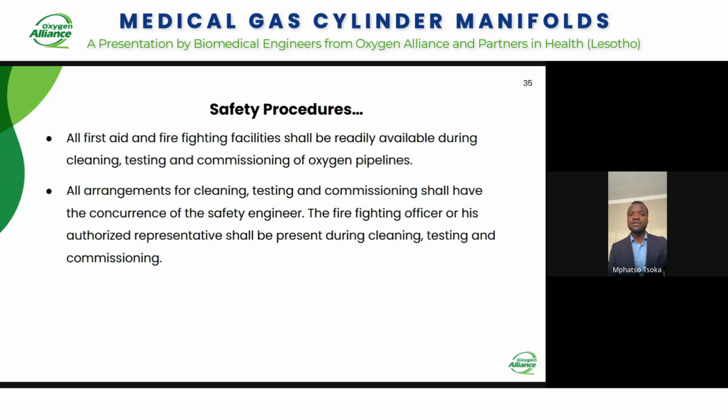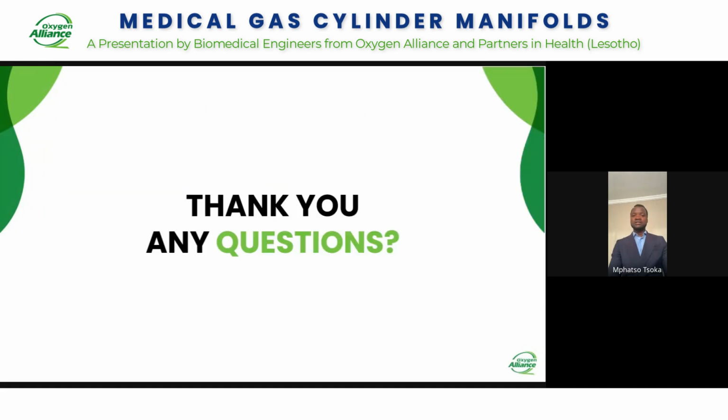And for all arrangements for cleaning, testing, and commissioning, the safety engineer and the firefighting officer or an authorized representative shall be present during the cleaning, testing or commissioning, just to ensure that all work is done with the help of the various departments that take part in the oxygen work, including the fire department.